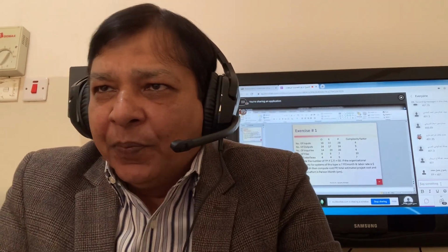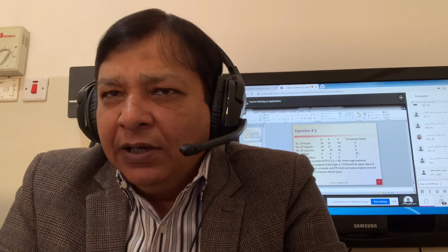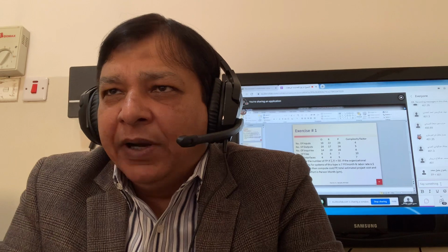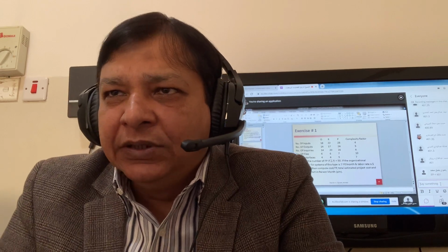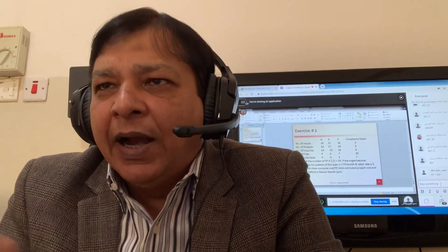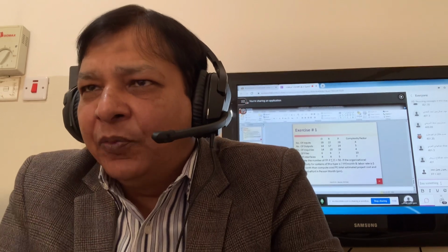What does it mean? It means in the new project you have to develop 401 functions. Function point is 401, that means approximately 401 functions in the new project we need to develop. That is the indication of function point. So we calculated function point for exercise 1 in today's lecture.